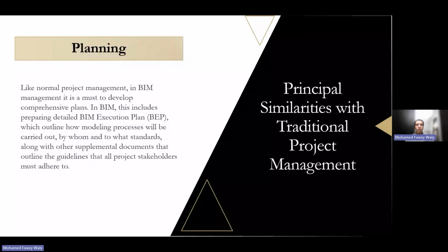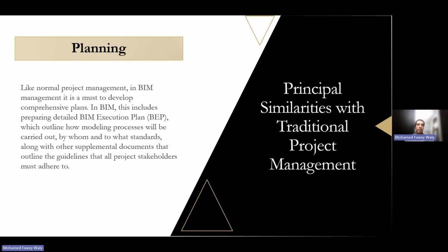For example, we all know the detailed BIM execution plan, known as the BEP, that outlines all the modeling processes that should be carried out by all the stakeholders, and defines who should do every task and to what standards. In addition, multiple documents should be prepared and shared with all the stakeholders. So planning and sharing these plans with all the project stakeholders is one of the parts that should be covered by BIM management.